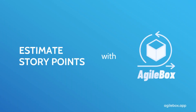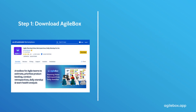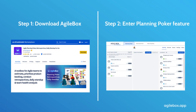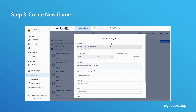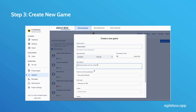Here's how to estimate story points with Planning Poker for Jira by AgileBox. Step 1: Download the app from the Atlassian Marketplace. Step 2: Open the app in Jira and go to the Planning Poker tab. Step 3: Click the Create Game button to create a new game. Fill in the required information, including the deck choice.